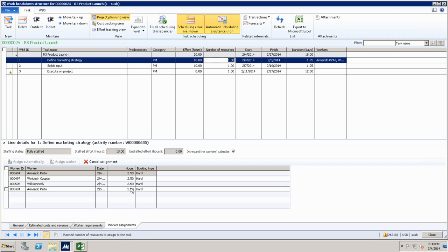Any other questions? Yes. So the moment you assign a resource to the project, either team or activity, we are automatically adding that resource to the project validation group. So those resources can go and report time and expense against the project. So even if you did not ring fence those team members, but you go ahead and assign them into the task, will it automatically add them to the group? Yes, and let's look at that. That's a good scenario, basically.